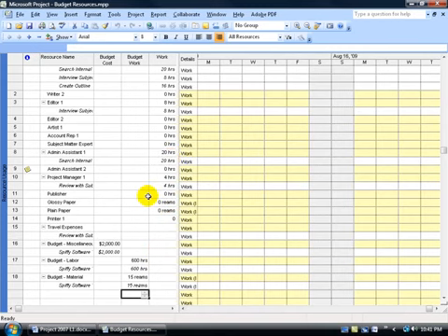Instead, what I recommend is that you go ahead and group by resource type. Anytime you take a view and you group it, it'll give you the total of those groups. So if we group by resource type, remember we have 4 types of resources. There it is, the reams, the materials. Then we have our labor, our work, which are our hours.